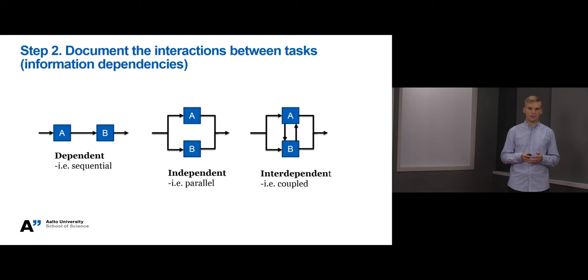In the second example in the middle, task A and task B are independent of each other, meaning that they can be executed in parallel, that is at the same time. In the last and third example on the right, tasks A and B are interdependent on each other, meaning that they both require information from each other. These tasks are called coupled tasks that should be completed at the same time in close collaboration.